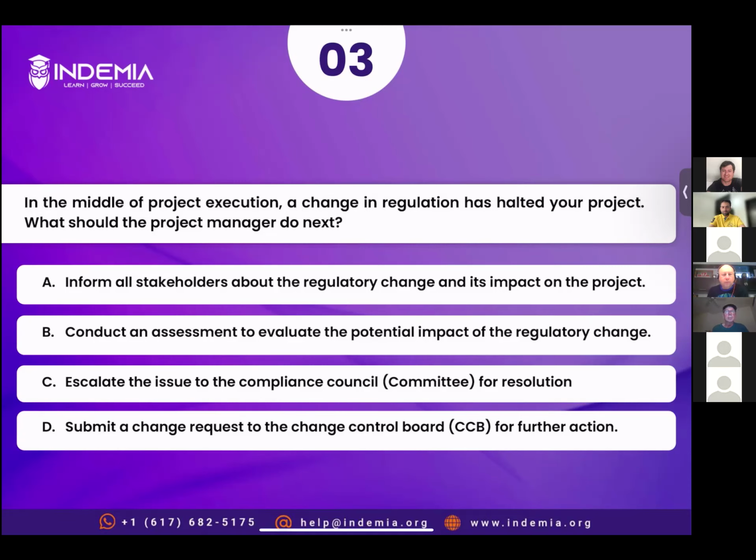I can see some of you have chosen option D. So submit a change request. We do not directly submit a change to the CCB. If you recall that flow chart that we discussed in the course regarding change management, first the project manager performs the preliminary impact assessment. You understand, everybody? Project manager performs preliminary impact assessment, and based on their assessment, they reject, approve, or forward the change to the CCB. So the next step can't be forwarding the change to the CCB.